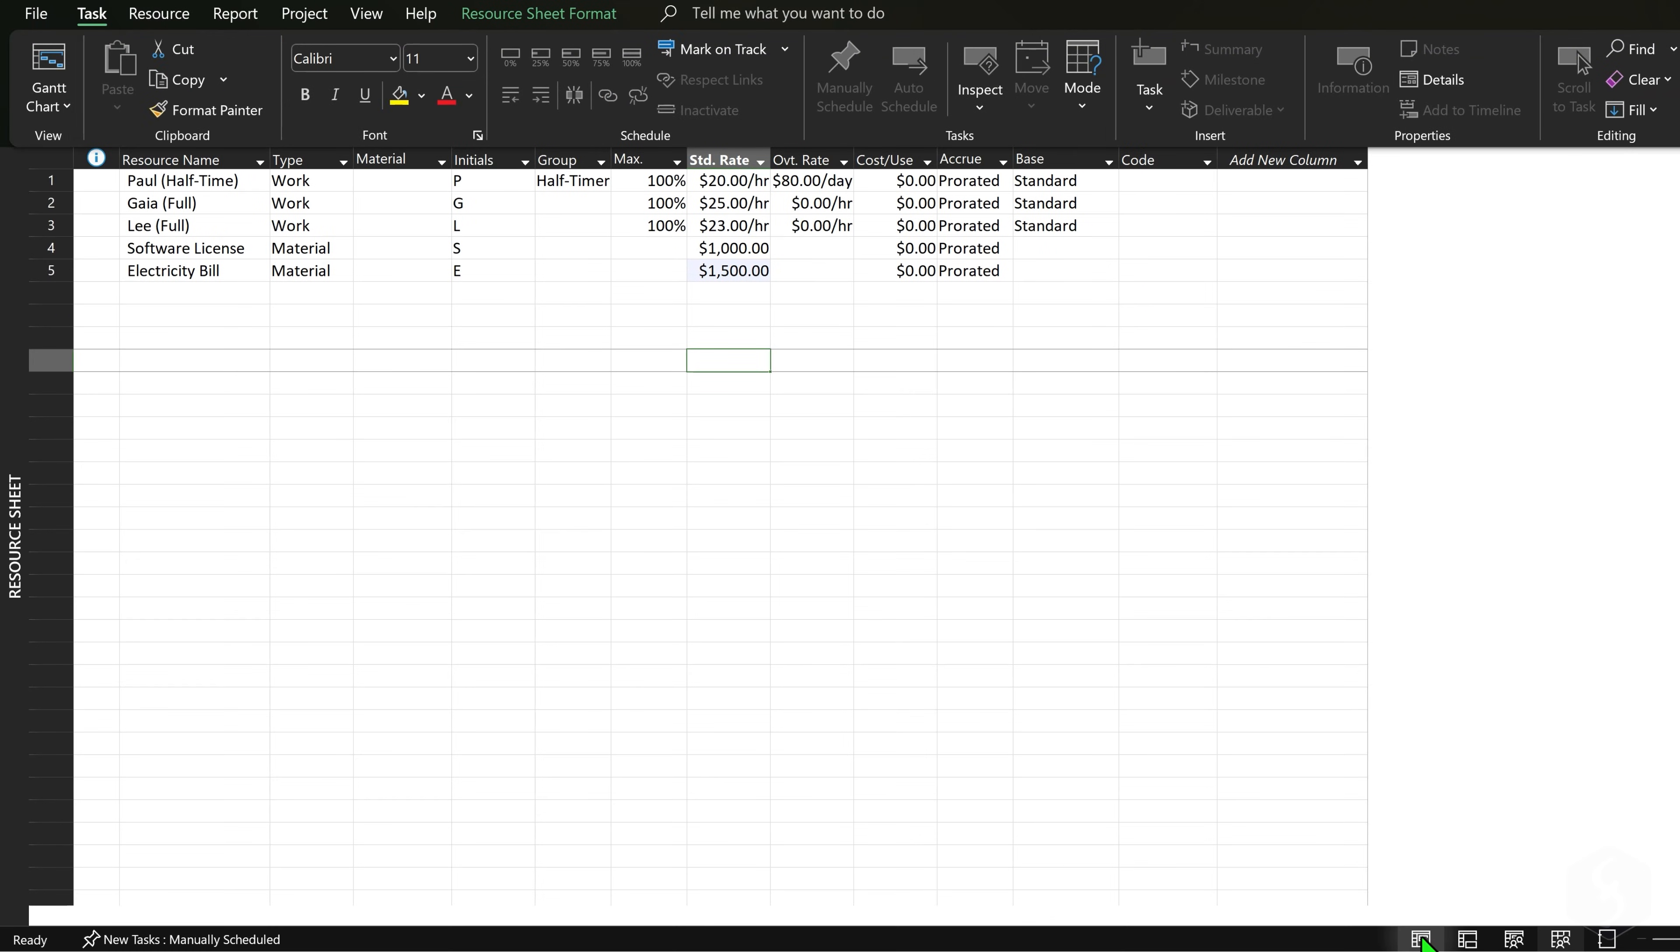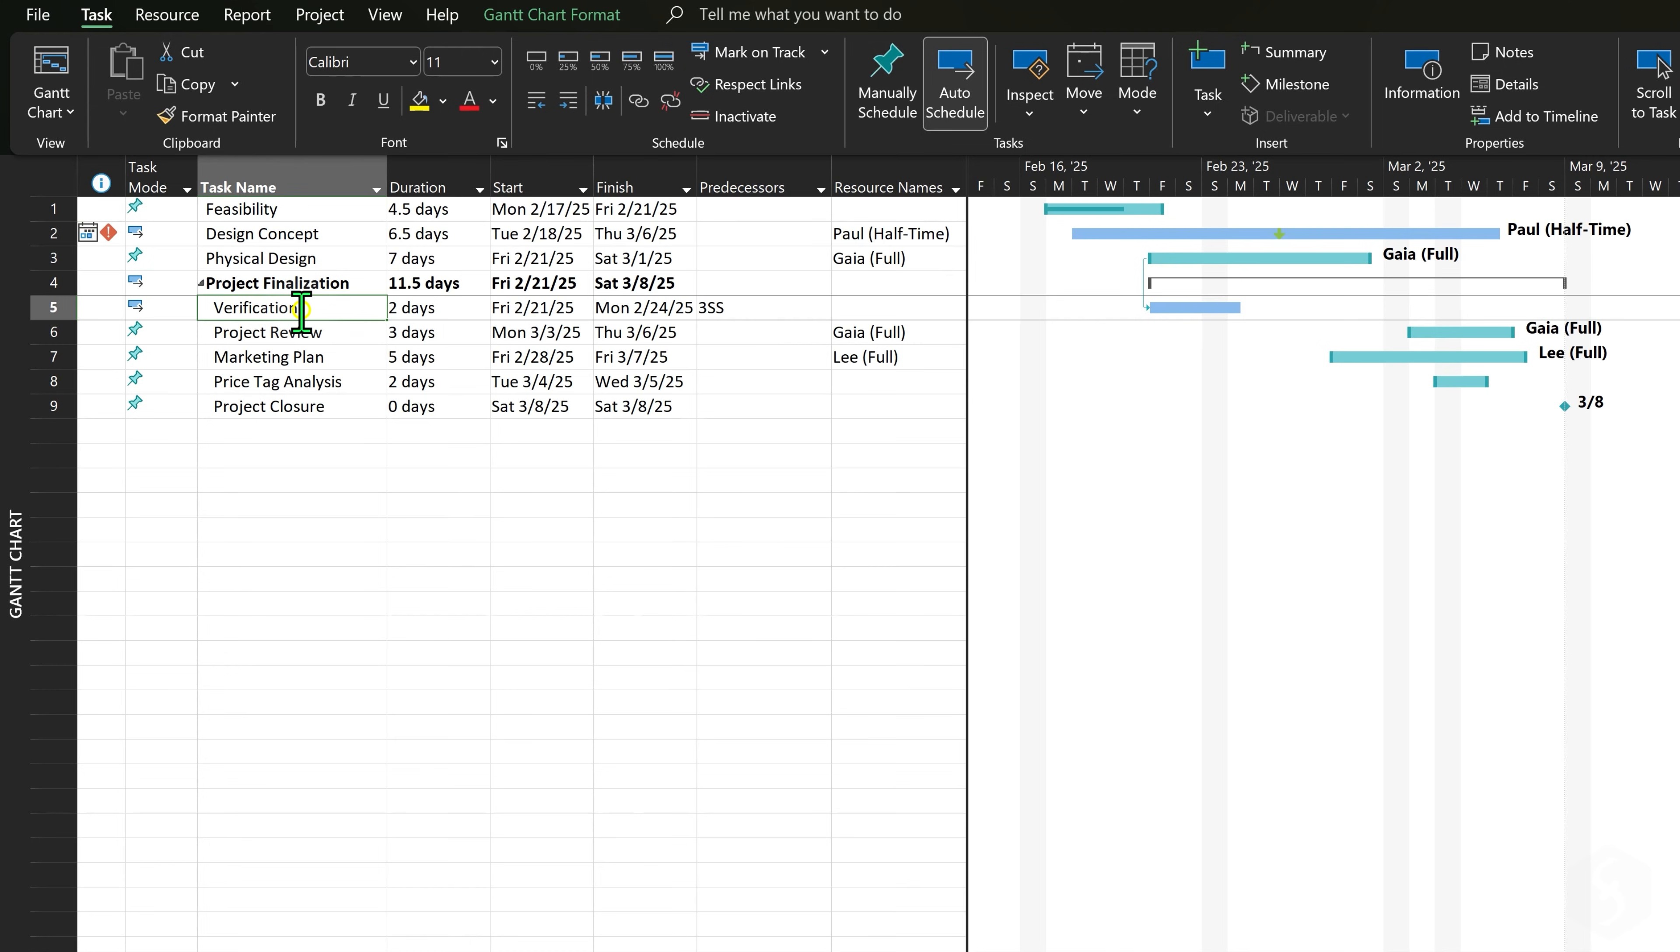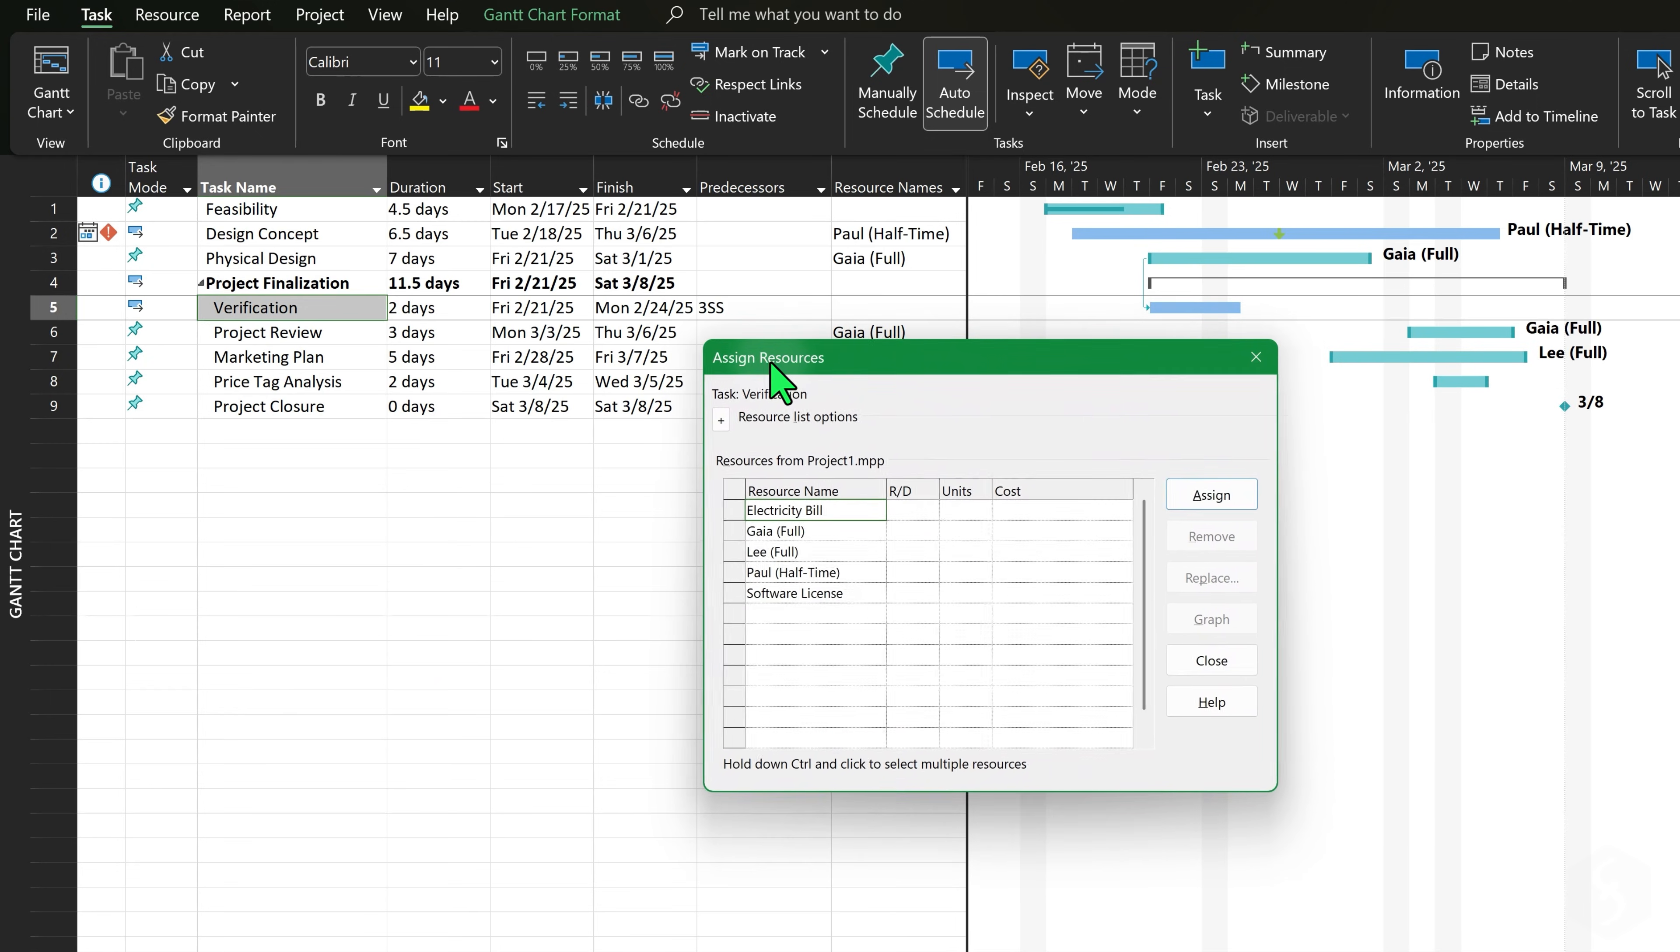At this point you can come back to the Gantt chart, right-click on any task and go to Assign Resources to include materials or equipment costs besides your team members, specifying the number of units required.